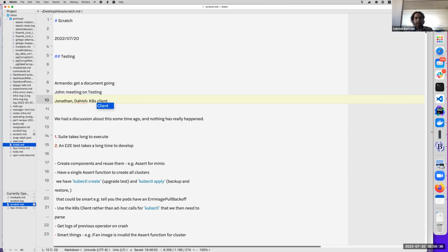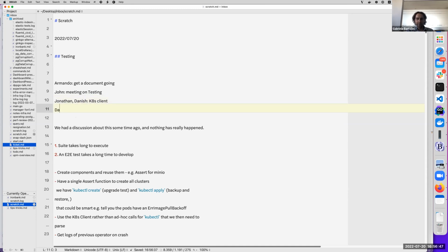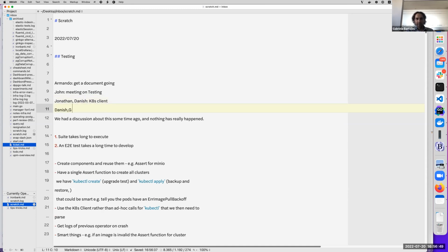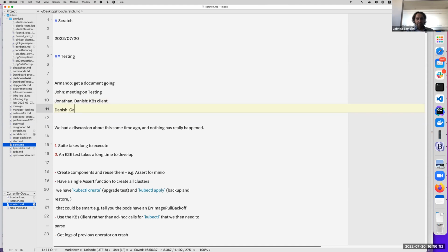Also, I find interesting what Danish said, that end-to-end test tickets keep piling up because there's not enough review, or review is not done on time. My advice is that when that happens, we should stop writing new tests. I agree. Manufacturing principles I've always found, although counterintuitive, they work.